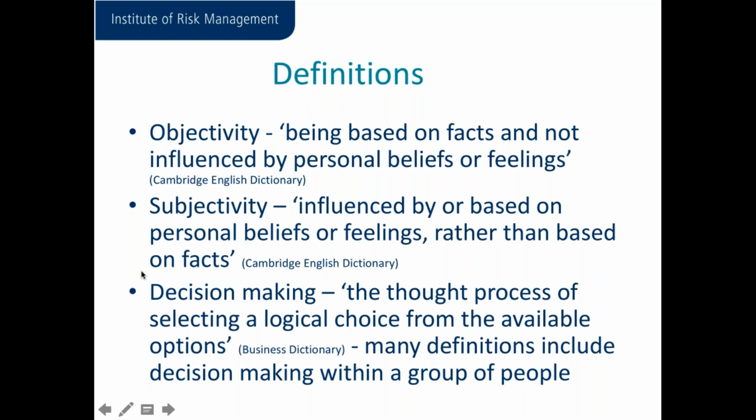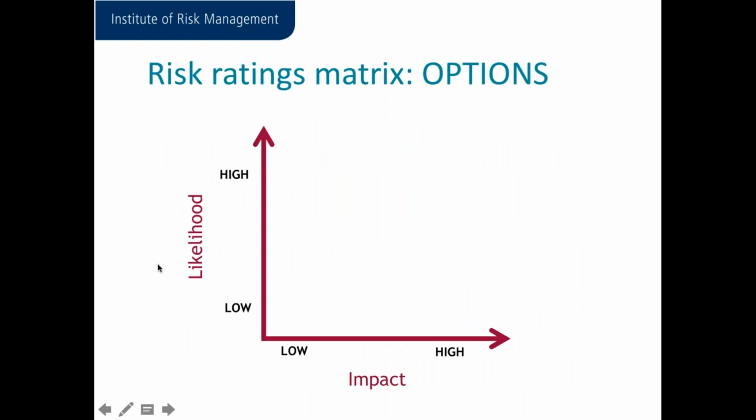So you can kind of say, so what? What does all of this mean? Well, if we're thinking about all those terms and decisions, we need to consider how we're going to make an objective decision when trying to analyse risk. So as risk is an uncertainty that matters, we usually look at the likelihood of the risk occurring, because that helps us measure the uncertainty, and the consequences should it occur, which can help us measure the impact. And we do this using a simple scale like this.